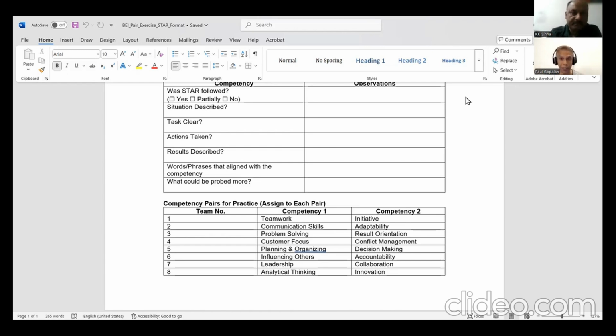So the specific actions we did: first we went into checklisting based on the deliverables of the program, the scope of the project. Then we checklisted against the deliverables, and we also went down to the budget and the requirements of the client. Anything out of scope, we needed to address with the client. So specifically, when I was leading that team, I checklisted against deliverables and also things which were out of scope, which my project managers could do.